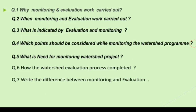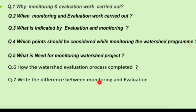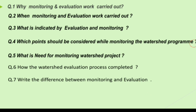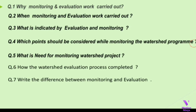The last question: write the difference between monitoring and evaluation. Monitoring is a continuous activity while evaluation is done at the midway or end of the project. Monitoring is for immediate use while evaluation is for future planning. Monitoring is conducted by implementing authorities while evaluation is conducted by a third party. Monitoring gives immediate correction while evaluation gives future correction direction. This is the end of the video. Thank you very much for watching. Please like, share, and subscribe to the channel.